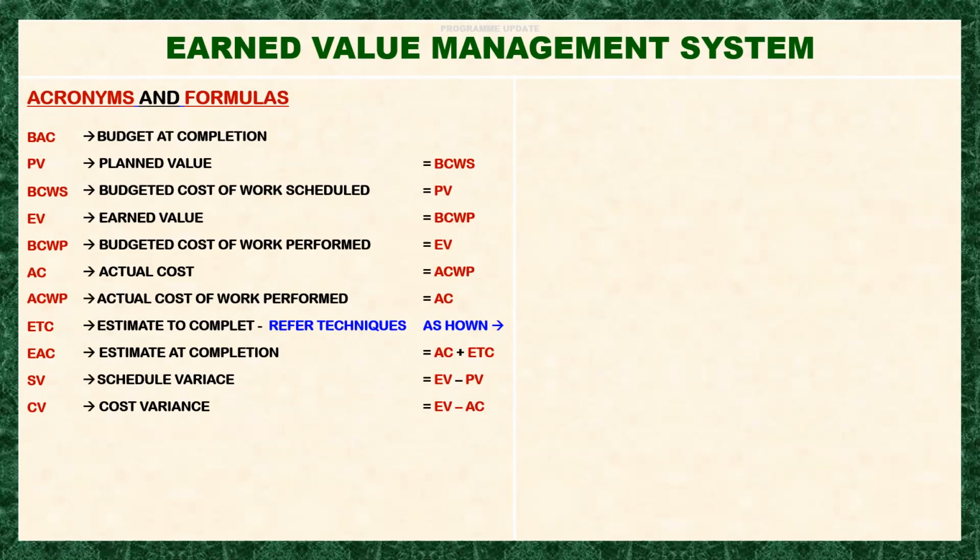That means here you will determine whether you are working with too much cost. So it is good when your project goes well: your performance or earned value should be greater or bigger than your cost. But if you are spending more than you really earned, you are losing money, right? Okay. So that's the purpose.